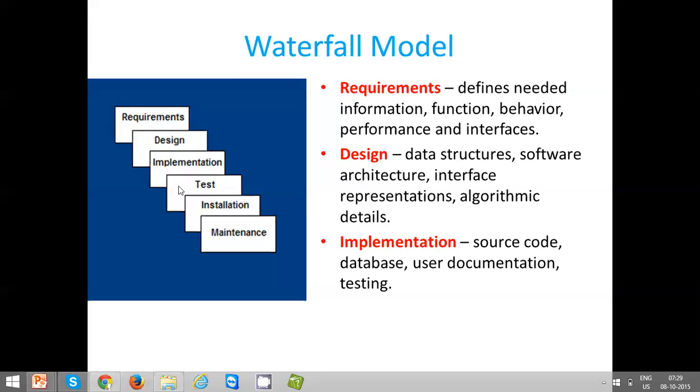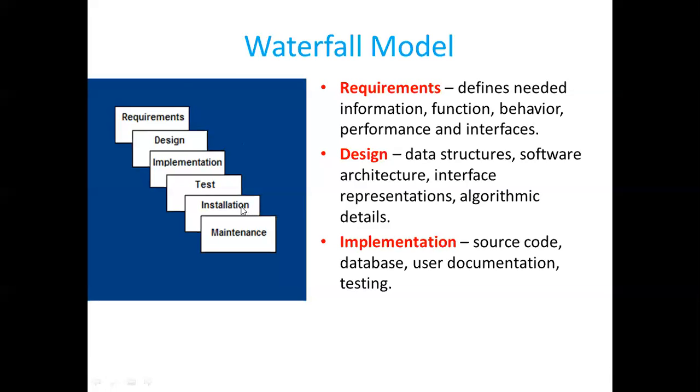There you have to write a set of test cases for the application and make sure those test cases are working fine against the application. If any test case fails, yes, you have to raise a defect, all those things you have to do. So everything will happen in the testing phase. Once testing is also completed, you certify that this particular application is ready for the market, this is working fine. Then what you have to do, you have to go for installation. You have to install it on the production environment.